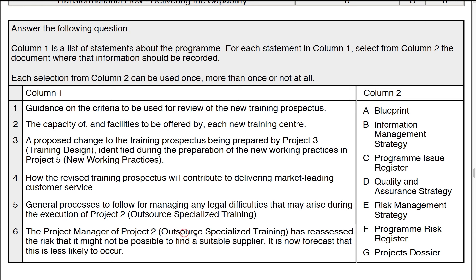Finally, statement six: the PM of project two has reassessed the risk that it might not be possible to deliver. This is a reassessment and forecast — it's now less likely to occur, so its rating has changed. That would be recorded against a specific risk in the programme risk register, letter F.